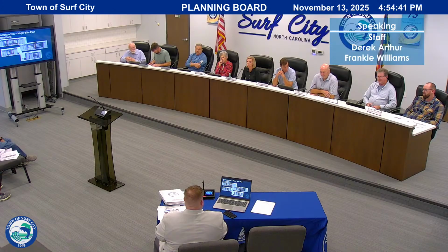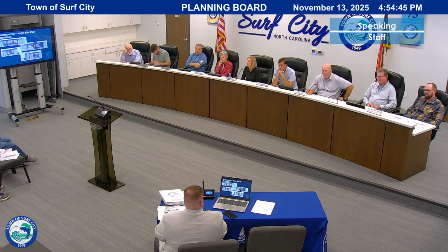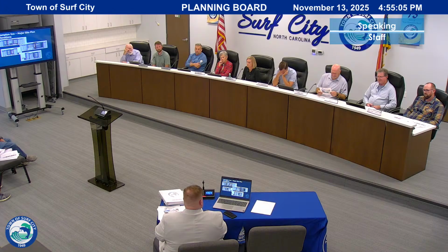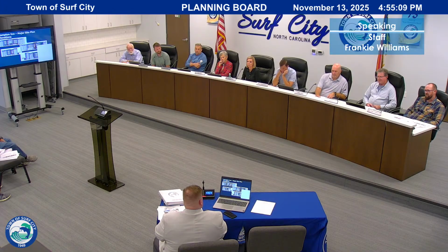You have a time frame? They have a ticking time clock to start digging to maintain, and Mr. Price can correct me if I'm wrong, their sewer allocation. I believe it was 9 to 12 months. So they're currently designing it. They had to get their location of Coretta Drive checked off by the town and DOT, but they're currently doing that. We haven't gotten that submittal, but we will be reviewing that soon, I'm sure, prior to receiving their first CO.